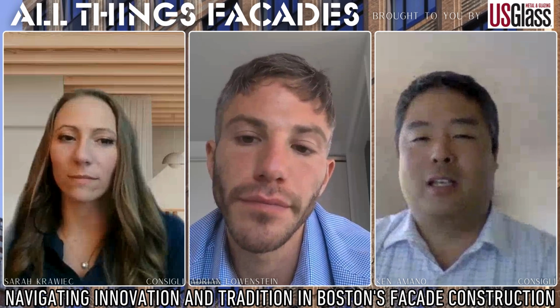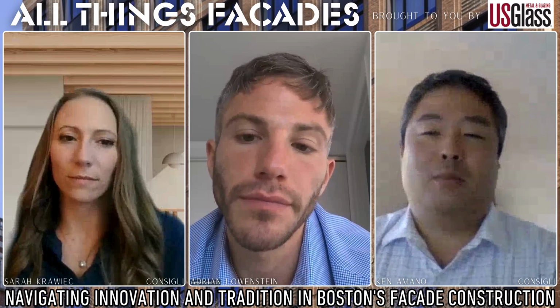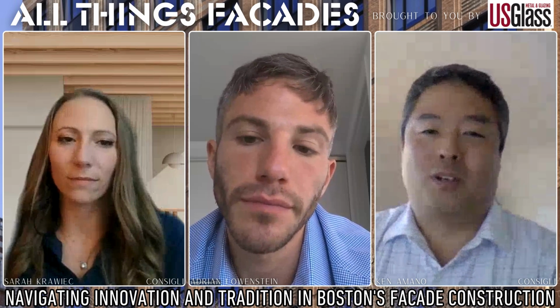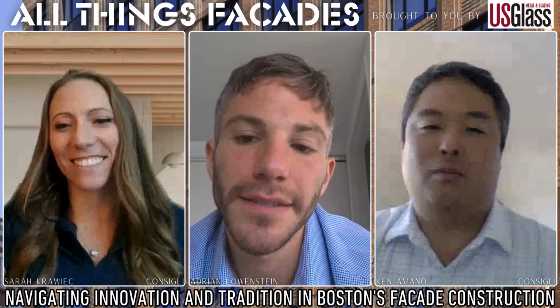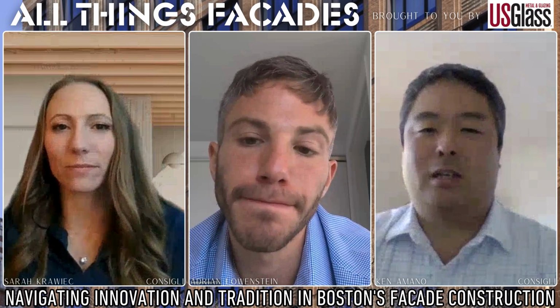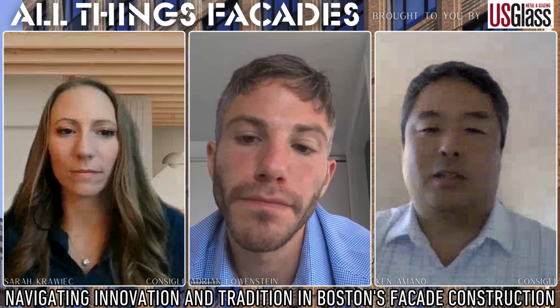It's just like the mock-up process that Sarah was talking about. The mock-ups are great. They're especially great in telling you what's not going to work, right? Not just what does work. But it's a free pass because then you fix it and it doesn't, hopefully, derail the critical path schedule and everything else. So it's the same kind of process.